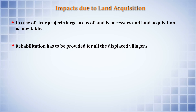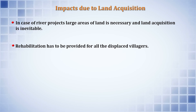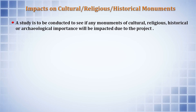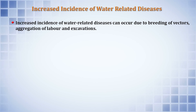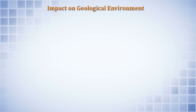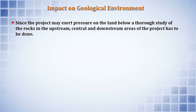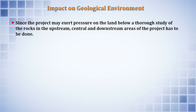Rehabilitation must be provided for all displaced villagers. Impacts on cultural, religious, and historical monuments must be assessed, including whether any historical or archaeological sites will be affected by the project. Increased incidence of water-related diseases, including breeding of disease vectors and aggregation of labor, should also be noted. Finally, since the project can exert pressure on the land below, a thorough geological study of the rocks in the upstream, central, and downstream areas of the project must be carried out.